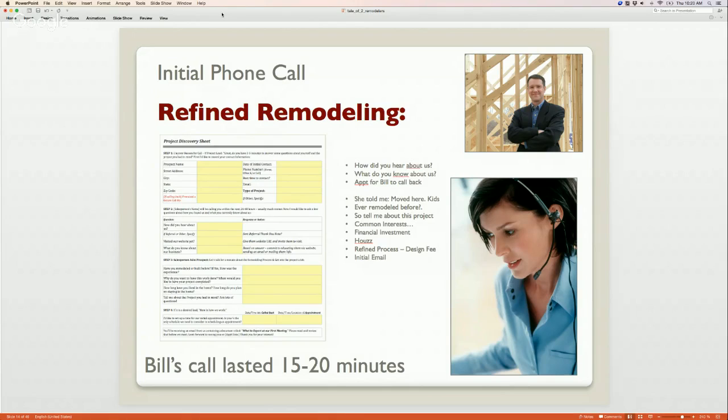And using your years of experience, you will be able to give some type of ballpark range a good majority of the time. Kitchens and baths especially. Additions, tougher ball game. Finished basements, depends on how many you've done. But for kitchens and baths, a range, okay? And this range might be, for a project like this based on what you're describing, I know your neighborhood, kind of know the style of the home, you're looking in the 30,000 and up range, and it really depends on what you're looking at.